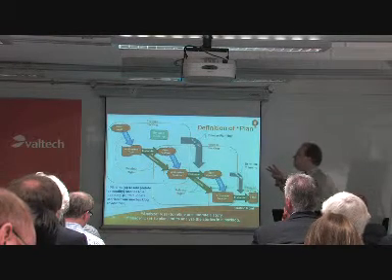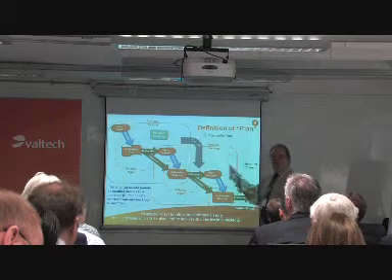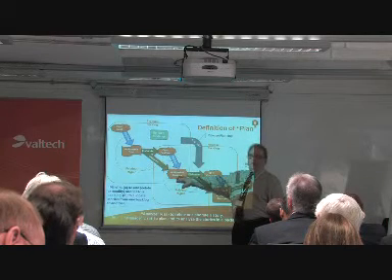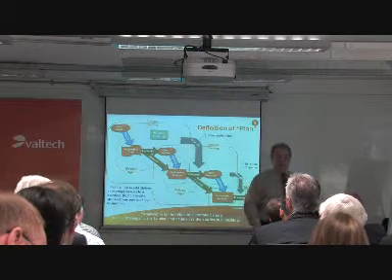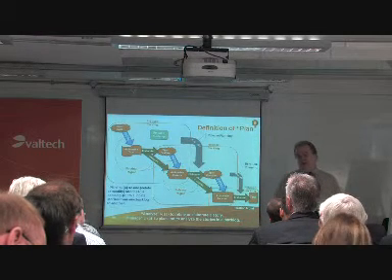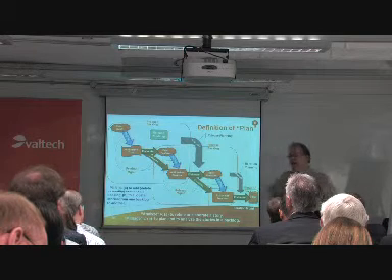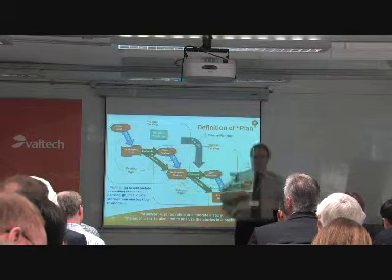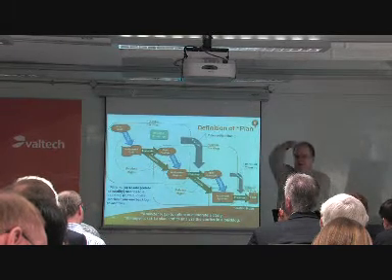There's a large literature on estimation and estimation accuracy and the notion of refinement of estimates. I can estimate at this level, but I also understand that that's a no fidelity estimate that has a quantitative definition, which means that the variance is 2.0. And it's a 2.0 multiplier. I'm off by 200%. But if I know that variance and I allow some contingency, I can actually give you good 90th percentile confidence interval estimates, it's just that they're a little wide.